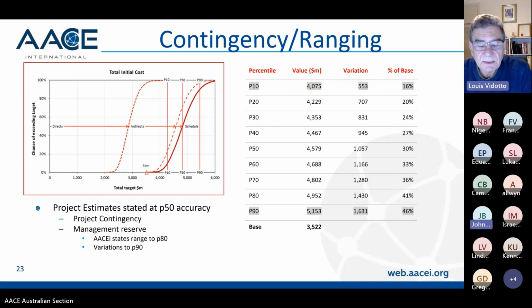Look, for me, John, the benchmarking is a whole different subject. I've reviewed estimates where there's been benchmarking put in by an engineering service provider, and they quote the projects that I have experience with, and the benchmark rates are nothing like what I know them to be. So the key thing for benchmarking is to get your actual data on your projects, and feed them back into your estimating process, so that you know the different commodities on different projects in different regions took so long to build and cost so much to do.